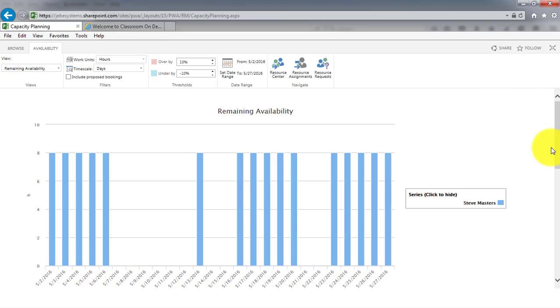As a project manager, you can work with your resources in that draft state, in that saved state, if you will, and only when you publish it will it actually have an effect on the resource from the perspective of availability. We'll talk more about that as we go through, but that's one of the main areas you want to be aware of: as you look for resources, you have to be sensitive to how they've been loaded onto the schedule.